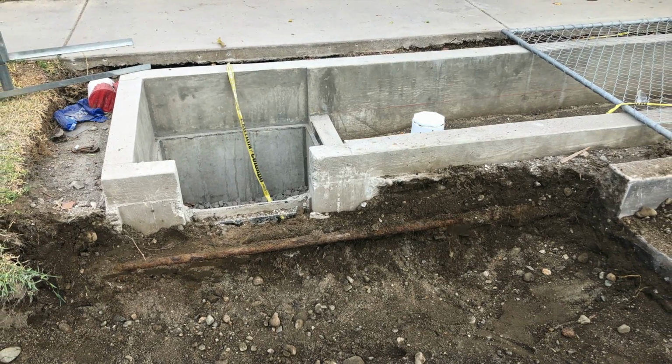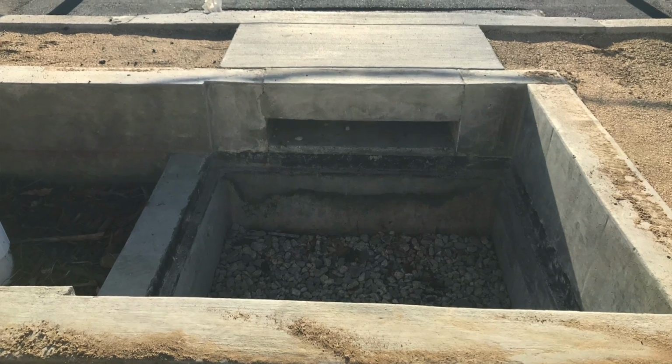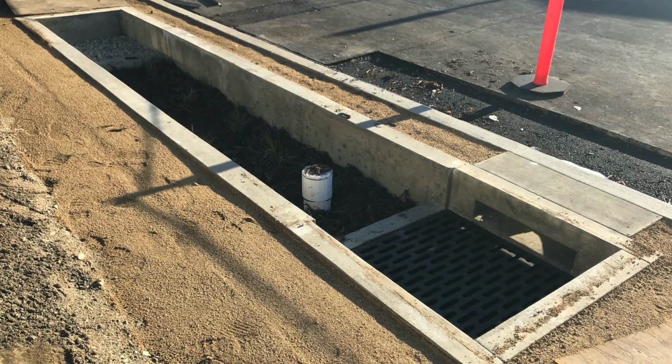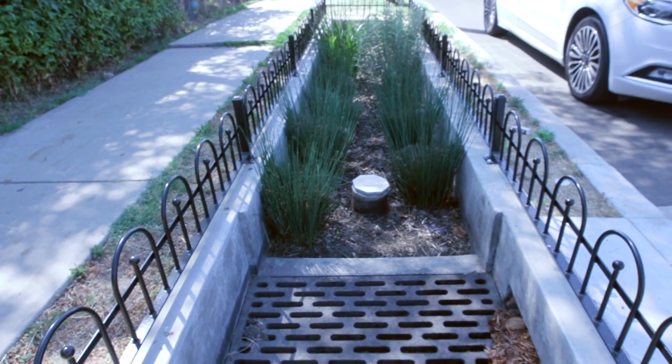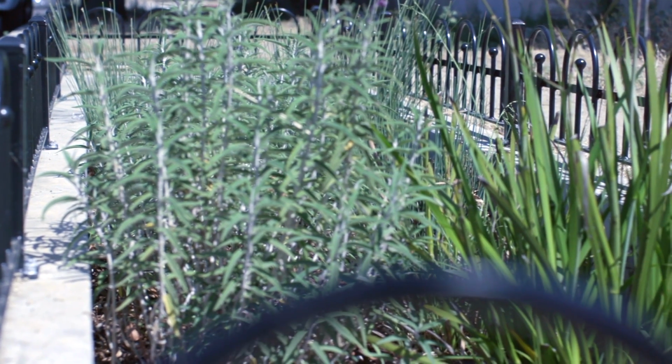The project was delivered using design-build, project delivered for the City of LA. It's unconventional, but there are some main benefits that the city realized. For example, we delivered the project within 14 months. That includes design. The second thing was we delivered the project at $0 change orders for the city, which is great. And lastly, it was one point of contact for the city throughout the entire process, and that made it very easy for the city.